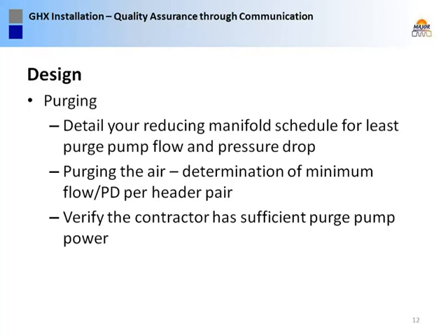And I like to early on make sure that the contractor, whether it's the driller or the mechanical side, has enough purge pump capacity to deal with that. Sometimes we have to tell them that's the way it's going to be, they've got to get it, or other times I might alter the design slightly because the guy doesn't have enough power and he's the only game in town. For whatever reason, if we can accommodate them, we will. If not, they're going to have to step up to the plate.